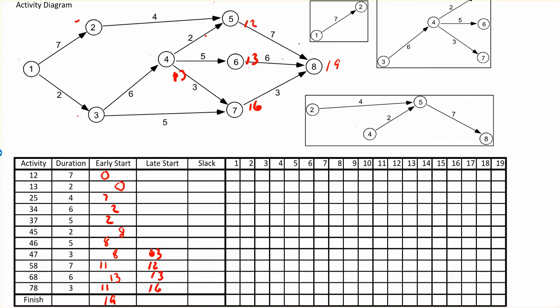Activity 4-6 can start as late as 13-5=8. Activity 4-5 can start as late as 12-2=10. Note that while the early start for all activities coming out of event 4 was the same (8), the late starts differ — 4-5 is 10, 4-6 is 8, 4-7 is 13. Activity 3-7: 16-5=11. Activity 3-4: the latest start is 8-6=2.